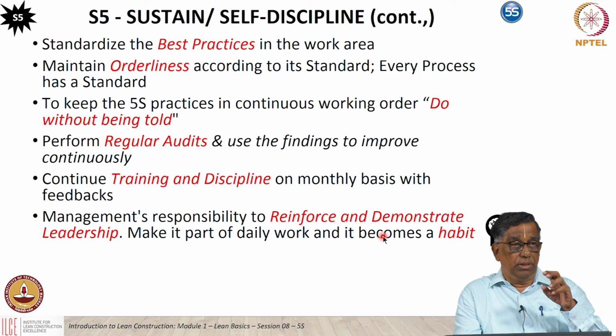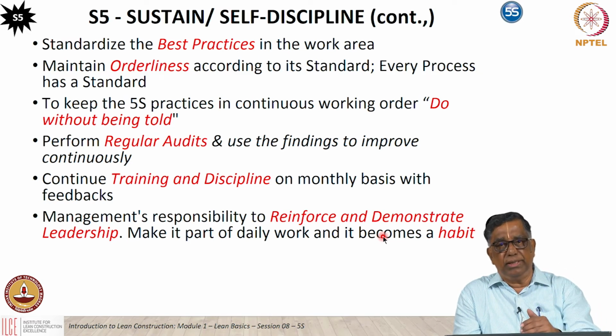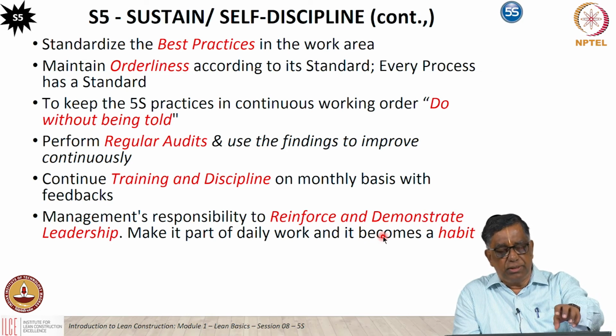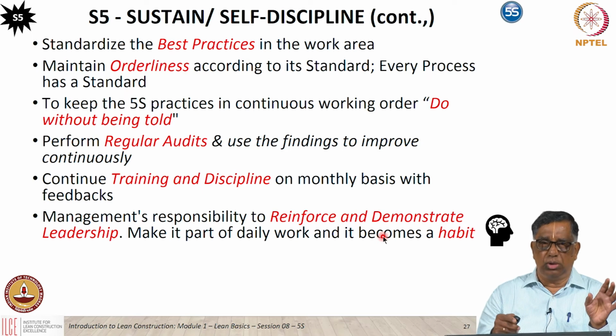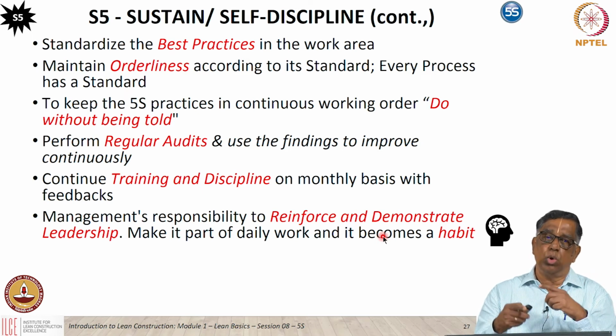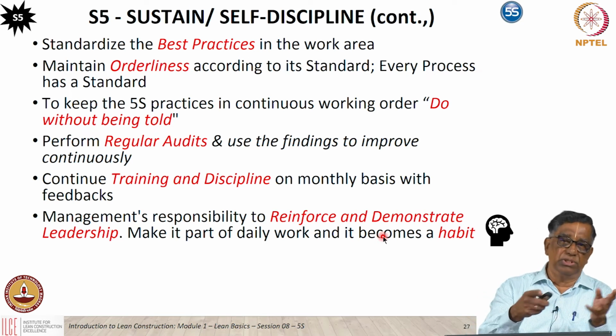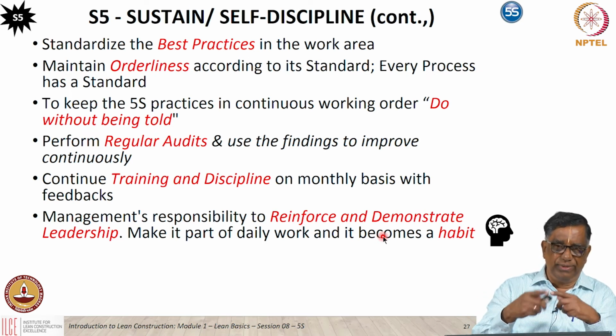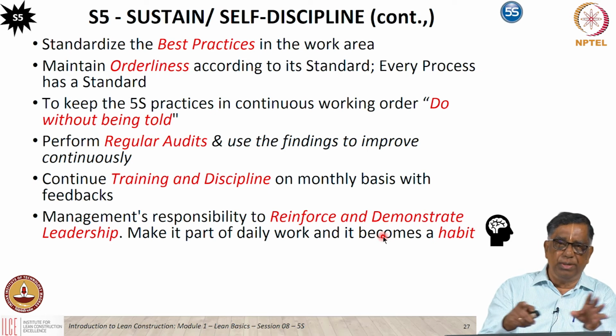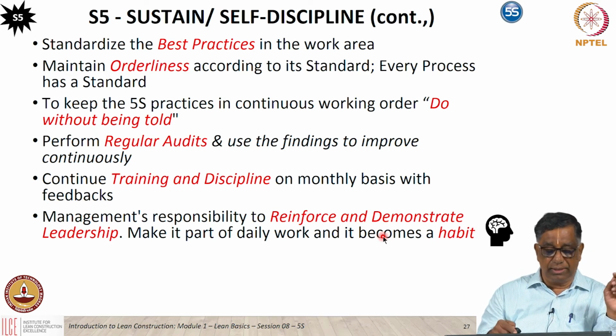So for example, shine. Shine means what? To what degree does a thing have to be clean? Sort means what? What kind of items are allowed to remain at the site? What kind of items are not allowed to remain at the site? So we give scores, and then we compare. We ask the people, are you happy with the score which you got? Come back, refine that. So ultimately, the SOP becomes a document which is well understood, well practiced in the long run.